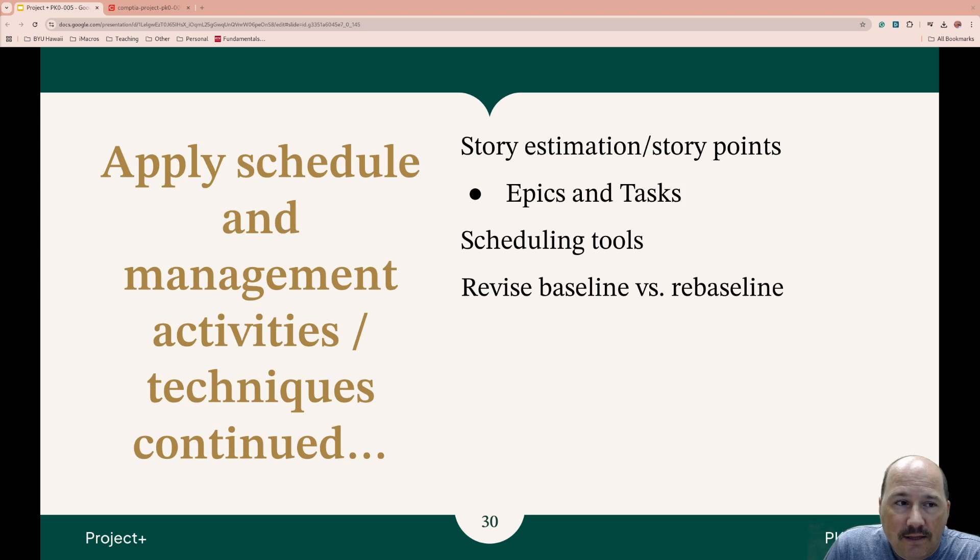Continuing on with this topic, story estimation and story points. Story points are units using agile methodologies to estimate the effort to implement a user story. You consider factors like how complex it is and the amount of work that's involved. When it comes to that, then you have epics and tasks. Epics are large bodies of work that might span multiple sprints. They're broken down into smaller workable pieces called stories so that you can work on them during sprints.